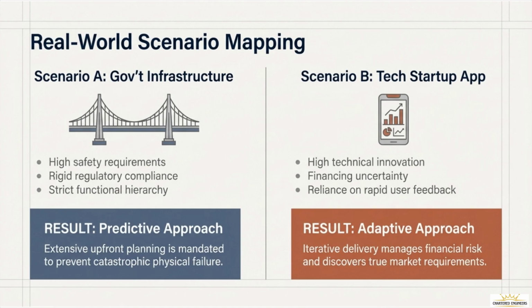To really cement these concepts, let's look at two contrasting real-world scenarios. This is exactly how the PMP exam will present problems to you. Scenario A is a government infrastructure project, like building a new bridge. Here, we have high safety requirements. People's lives are literally on the line. We have rigid regulatory compliance and a strict functional hierarchy within the government agency. The result? A predictive approach.